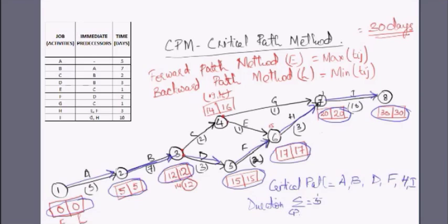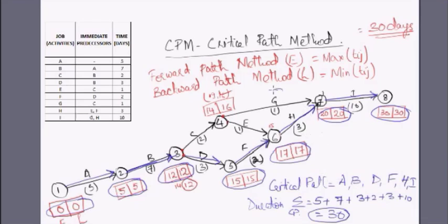The duration of the critical path: 5 plus 7 plus 3 plus 2 plus 3 plus 10 equals 30, which is exactly the project completion time. This confirms that the critical path controls the project completion time. Any delay in executing these activities will delay the project. The remaining activities — G, E, and C — are not on the critical path and have some gap, meaning they can be delayed to some extent.